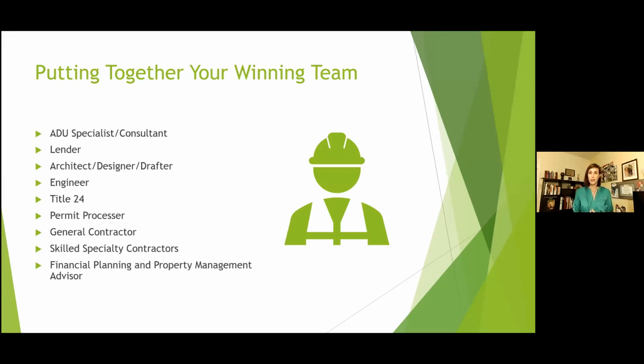right now we have got a skilled labor shortage in LA County. As skilled tradespeople have been retiring, we haven't had enough new people coming into those trades. And simultaneously, we have a lot of big commercial projects going on that are sucking up all of the talent. We've got a $6 billion airport renovation going on. We have a $3 billion stadium being built. We have billions of dollars worth of infrastructure in terms of light rail systems being built. And with the governor wanting to build 3.5 million units of new housing, we have apartment complexes going up. So it's very challenging to find really good skilled subcontractors, and for you to be a priority with getting them on your schedule.